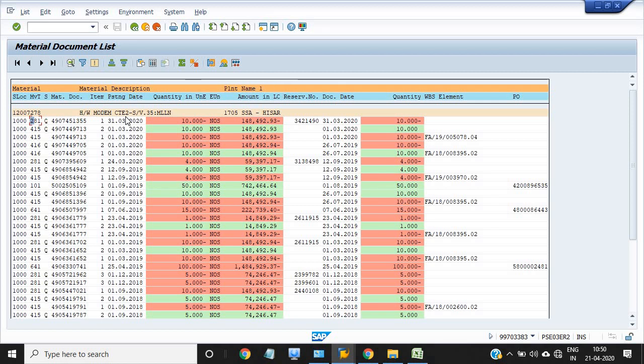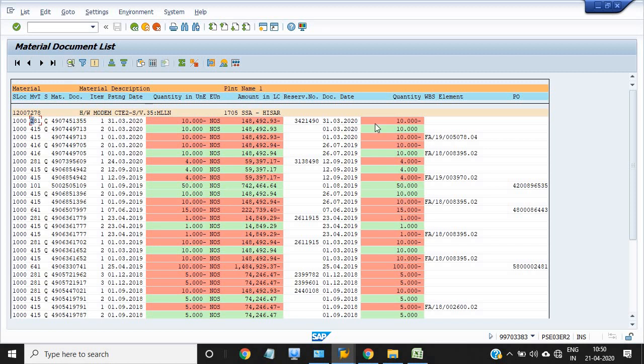We utilize our internal activity of the network. We just plan all the network activity from the material point of view. Internal is for the network activities, and external is for the services that we can have from the vendor. Also, you just check MB51 successfully posted on the previous financial year.